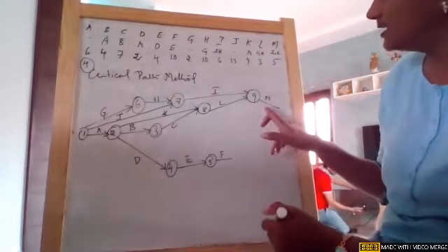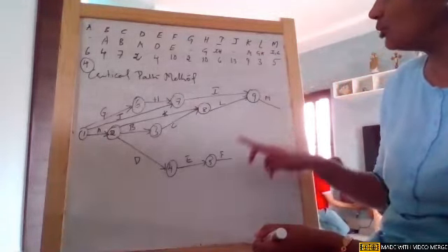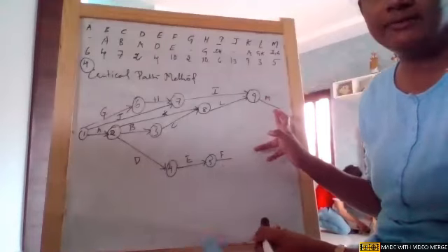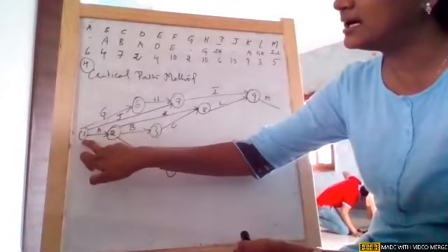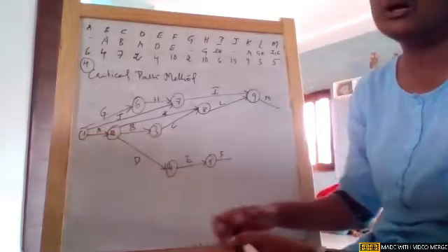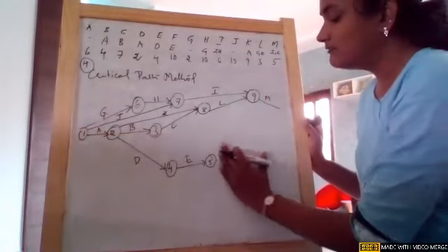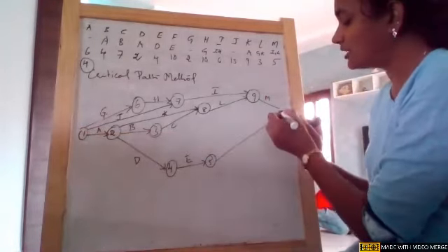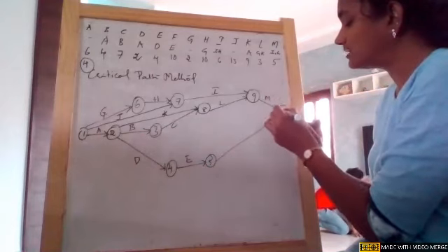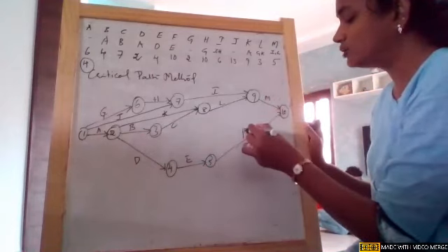So now, if you see, there are two events which are not ending with a node. Any network must start with a node and also end with a node. Very simple. Whatever are left out, join together and conclude it with a node. That is one more rule we need to follow.